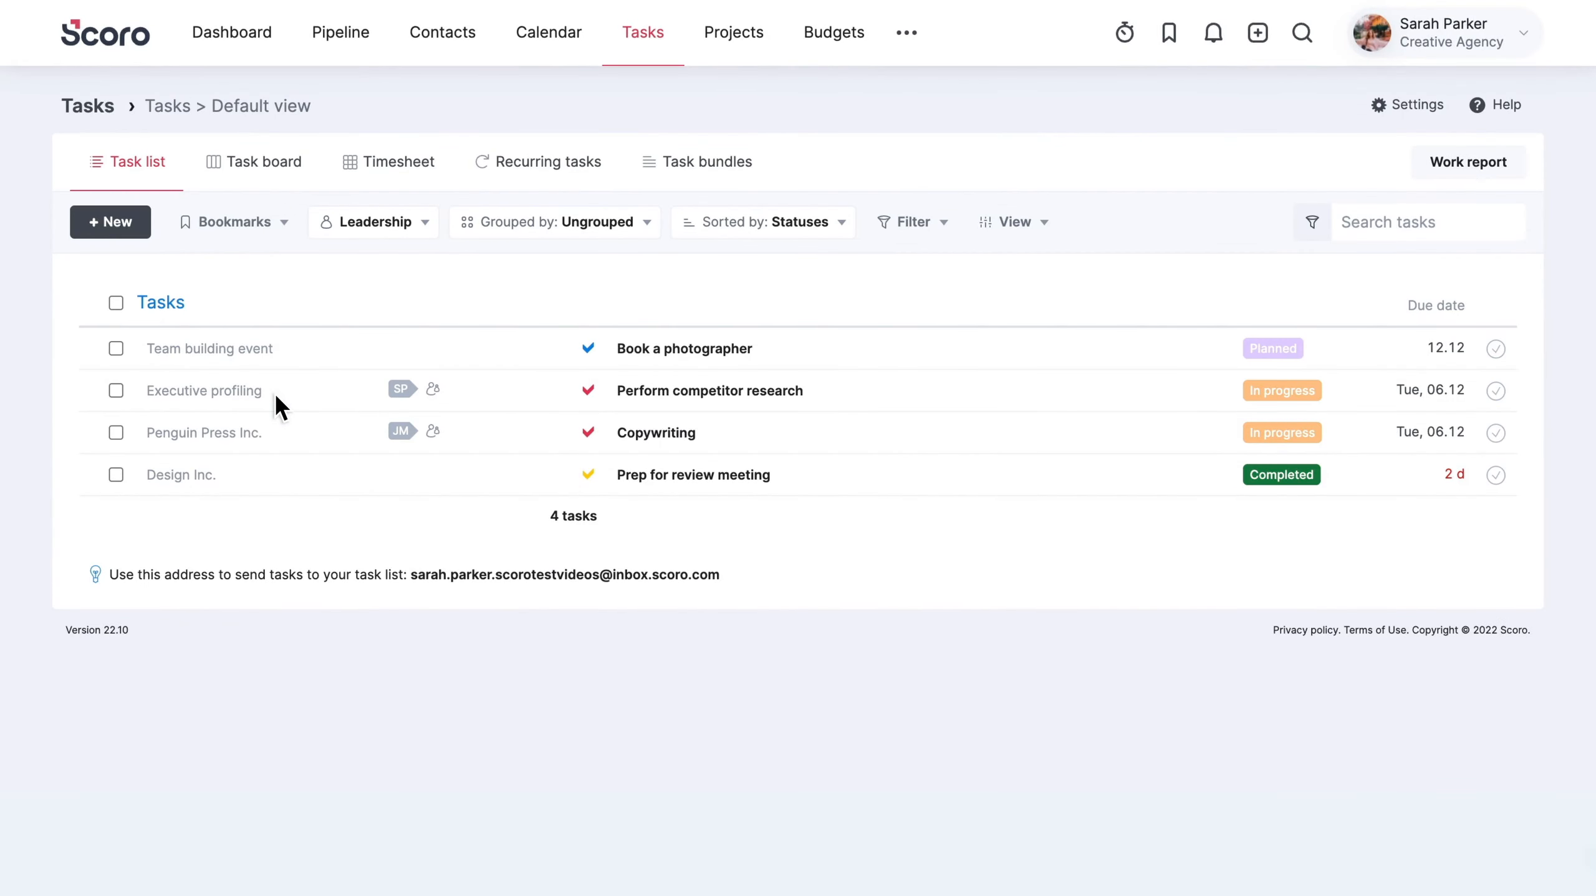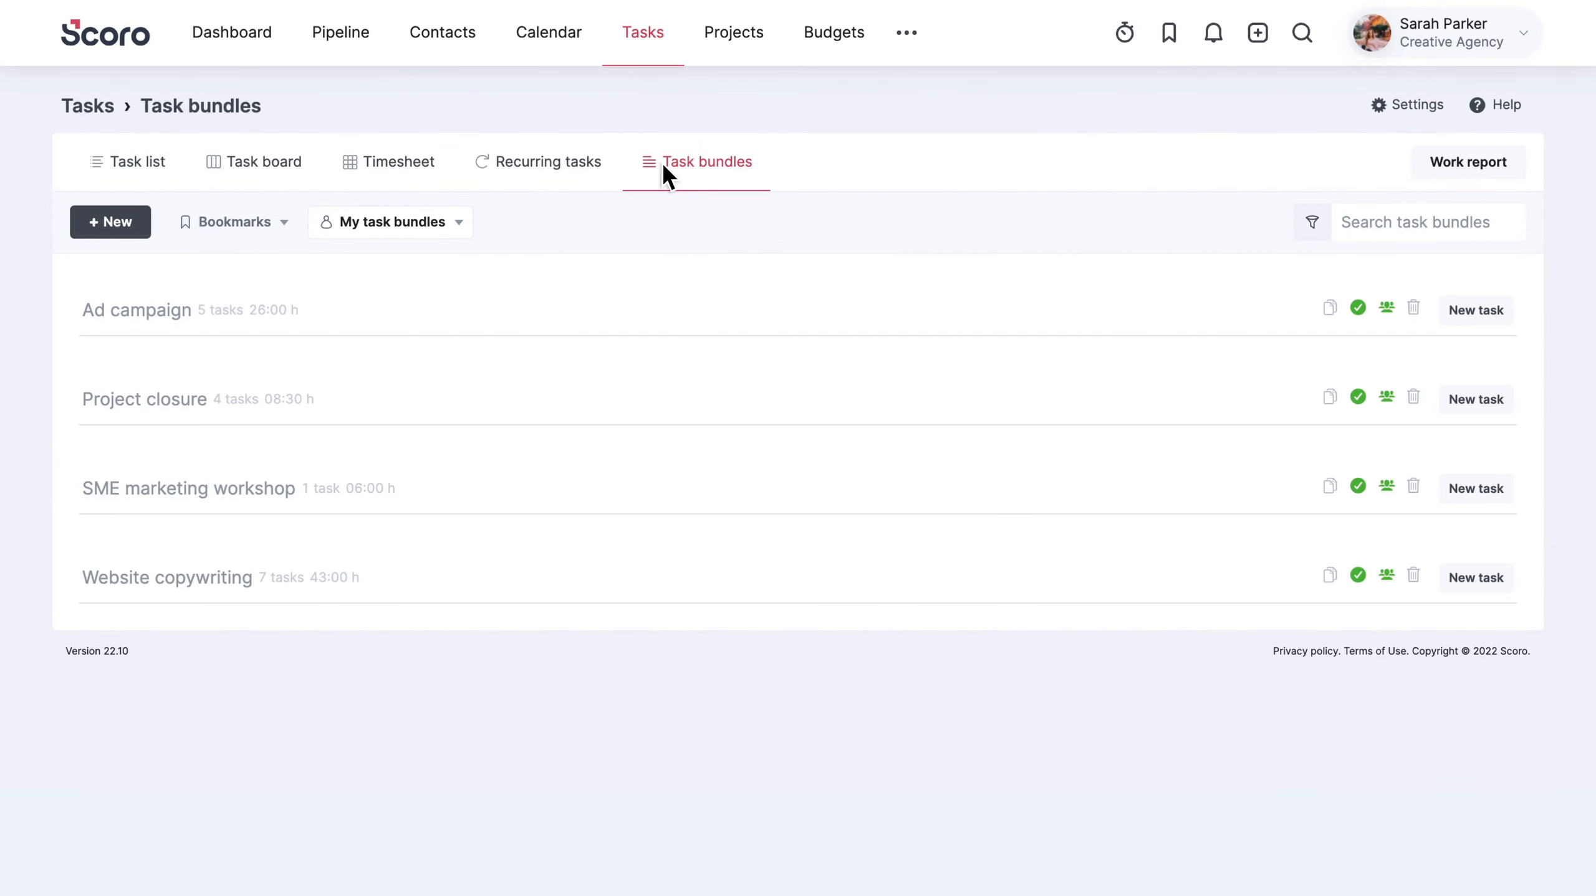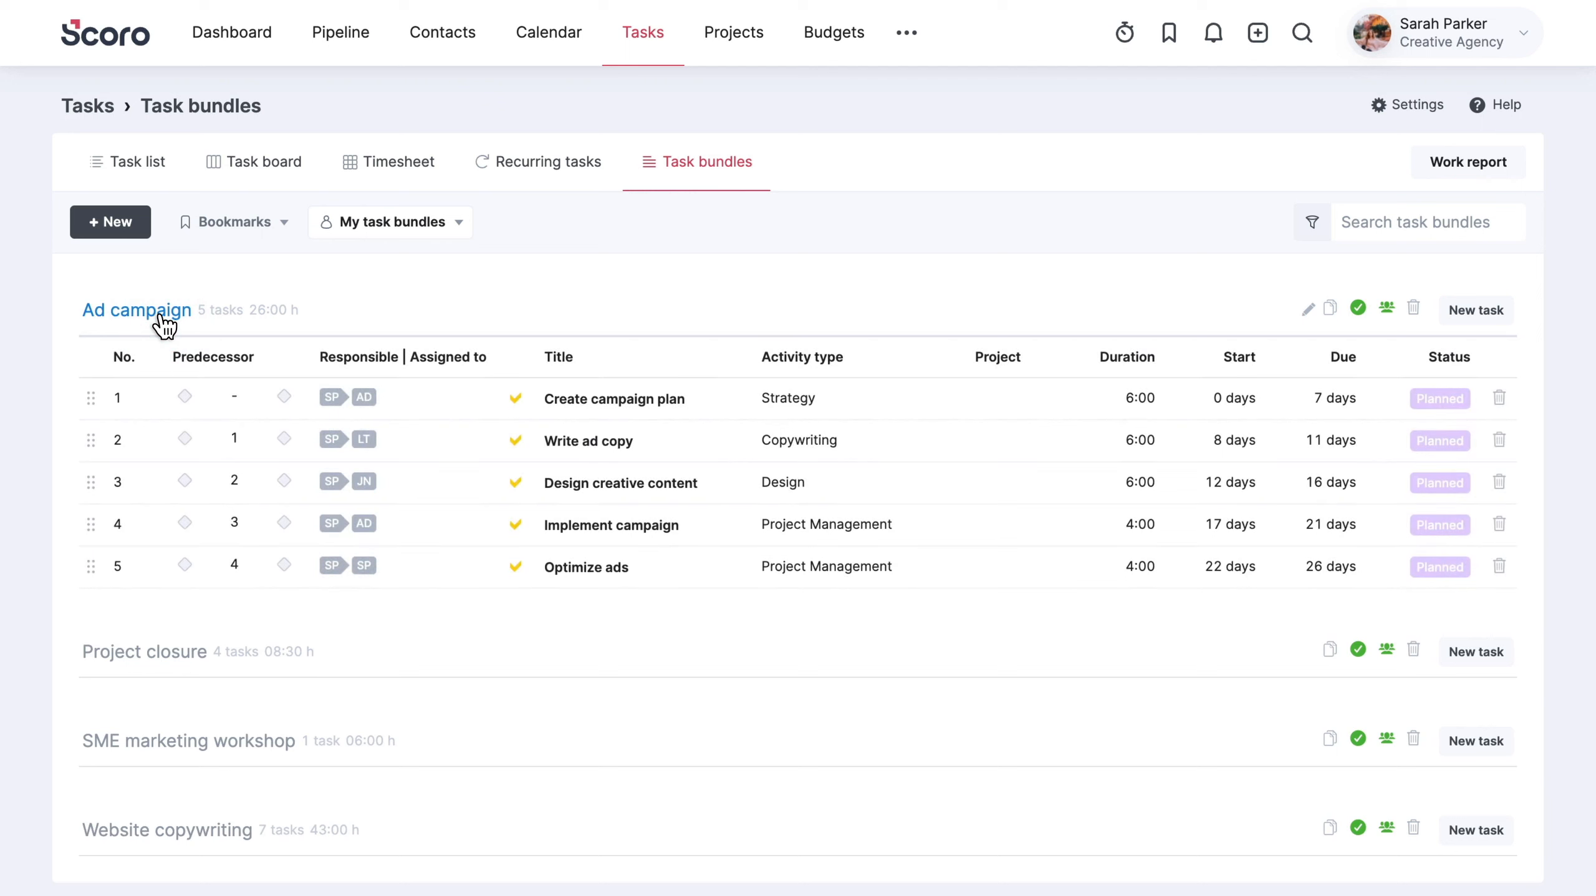You'll find the task bundle functionality in the task view. A task bundle is a set of tasks you can define for all routine activities and later use to build project templates. You can list all of the tasks that need to be completed within one project or its phase under one bundle.